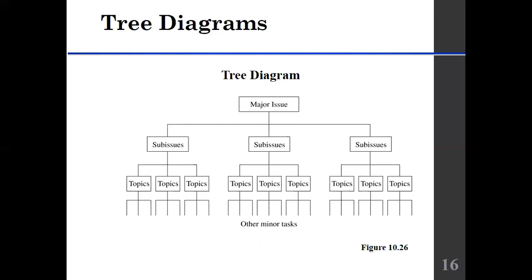So I hope you know about the work breakdown structure. But if you don't know, no problem. We will discuss it in the next coming lectures. But let me give you an idea of the work breakdown structure of a project. In a work breakdown structure of a project, what we need to do is to write the project name at the top and divide that project into different major tasks or work packages.